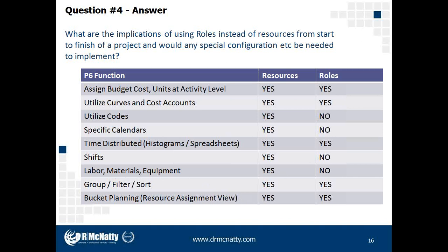The only other thing, and I don't mention it in here, that I'm really aware of as far as the difference in terms of usability or features is that if you are using EPPM or P6 Web, in the portfolio views, there is a capacity planning view that utilizes specifically roles and not resources. So it's a very graphical, very colorful view. If you are using that or desire to use it, roles will be required to get the best use of that particular graphic.